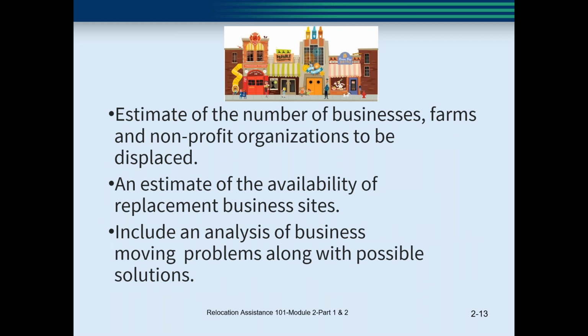So the visual clues can often tell you a lot when you are not to interview or disrupt the potential displaced people. You're going to look for toys in the yard. You're going to look for handicap ramps. You're going to search the internet for business websites, profiles. And one of the best sites to look at is the US Census. It's amazing the information that the US Census can tell you about a neighborhood.